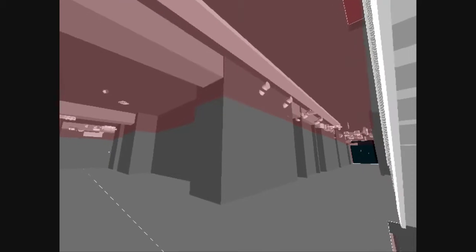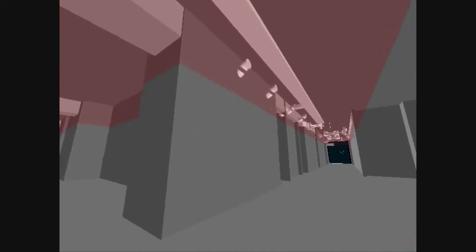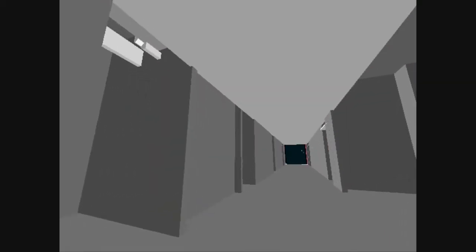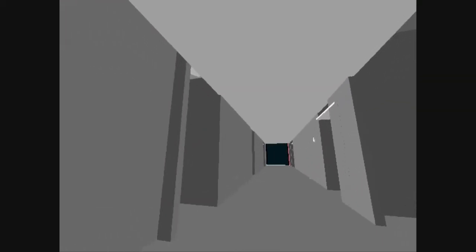Once the outer shell has been completely finished, the interior wall finishes will be installed floor by floor, followed by the ceilings, and finally the floor finishes.